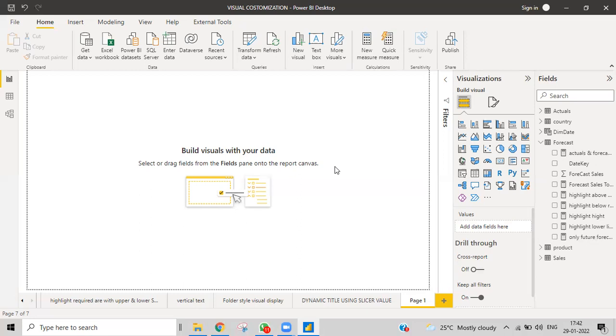Okay, and then afterwards, find the minimum start date. So you can get the least date, where at any point of time, any project may have started or has started, whatever it may be. After that, you need to calculate the difference between the minimum date and the start date for each and every project.